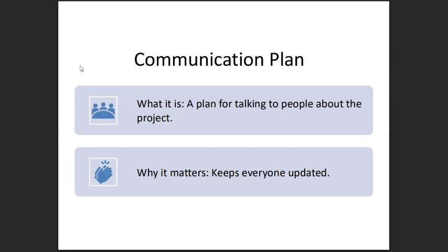You do the same for the different stakeholders identified for the project, including the clients, the vendors, if there are instances where we have a vendor for the project, the customers. All these different levels of stakeholders, you put them down, and then you come up with the communication strategy as to how you intend to manage them, especially because going into a project, you need to know how to engage your stakeholders. You need to know the communication strategy for engaging each stakeholder. Otherwise, there would be conflict, there would be issues, there would be communication problems, which is something you wouldn't want to happen during project delivery.